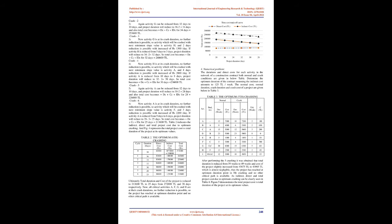Fitness function: depending on the purpose, different fitness functions could be applied. If the purpose is to reduce the duration of the project from T1 to T2, the project duration can be used as the fitness value. If the objective is to reduce cost, the sum of direct and indirect costs could be considered as the fitness value. But if the objective is to reach the optimum point — where both the sum of direct and indirect costs and the project time get the joint minimum — a mixed form should be used: Fitness(C) = total duration + direct cost - indirect cost. Here, total duration is the reduced duration relative to normal duration, and indirect cost and direct cost are respectively the reduction in indirect cost and the addition of direct cost.